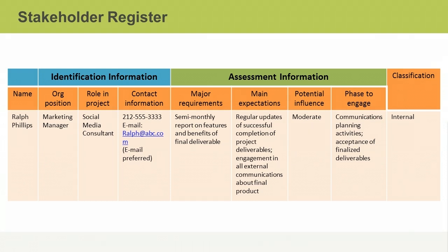Finally, record the phase in the life cycle during which the person will be most interested. Cross-reference the project schedule and your own to-do list so that you are sure to communicate with stakeholders at the right times in the project life cycle, such as sending a heads-up to the manager of the laboratory a week before soil testing begins.